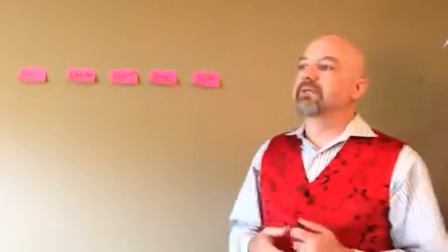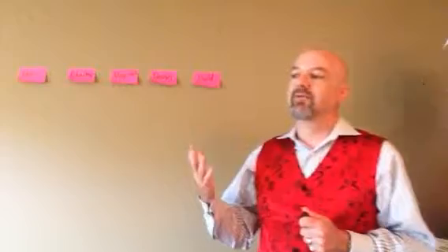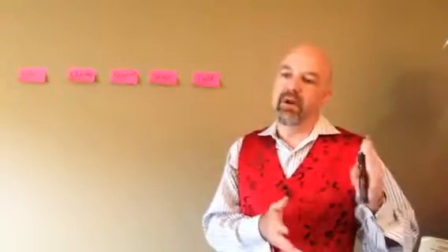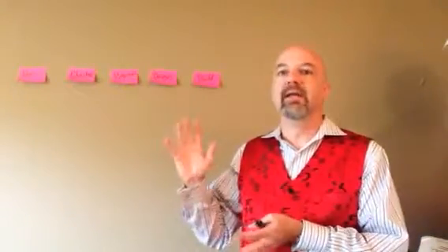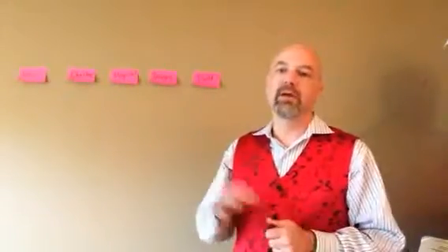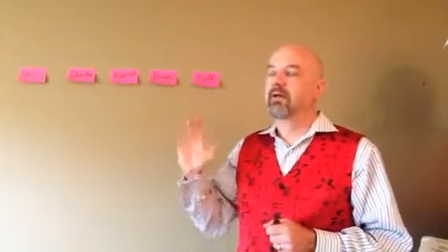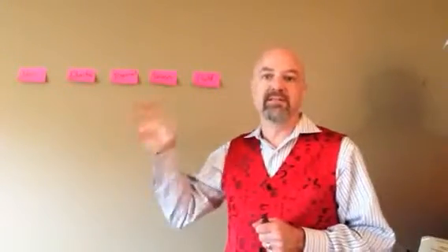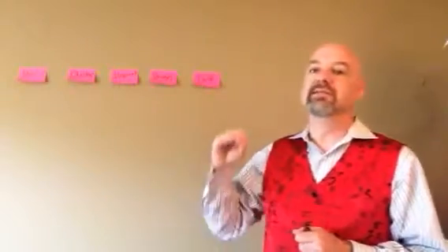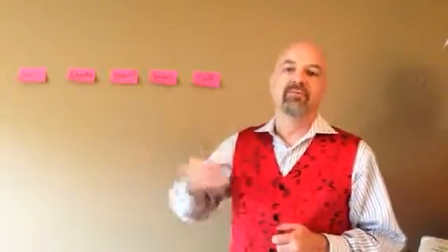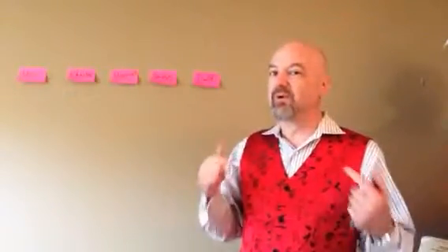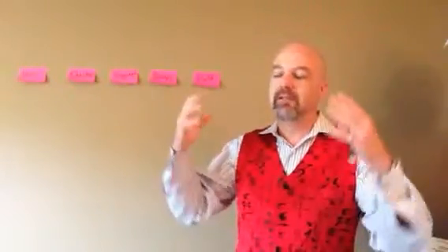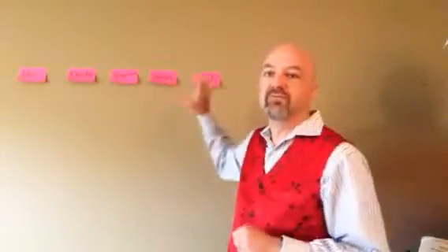So what we ended up doing is talking through and going from, hey, we need a Microsoft project plan, to, hey, maybe a sort of a Kanban-ish tool would help. And I'm not calling this Kanban because there's a lot more to a Kanban system than what we're going to put up here. What we're actually doing is simply visualizing the workflow. But if you're familiar with Kanban, you'll go, oh, that's a Kanban chart. It sort of is, but we're not putting WIP limits on things, and we're not doing some of the lean process improvement stuff. We're just trying to visualize the workflow.